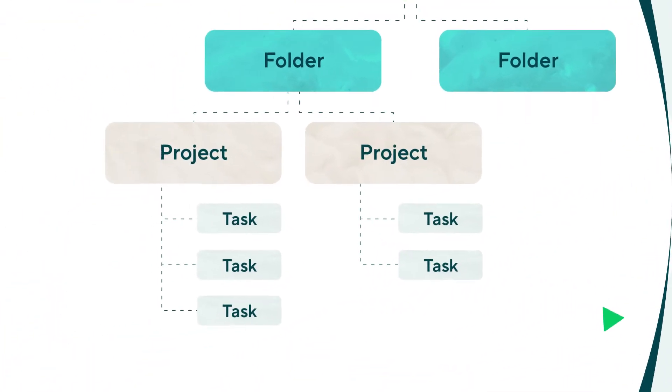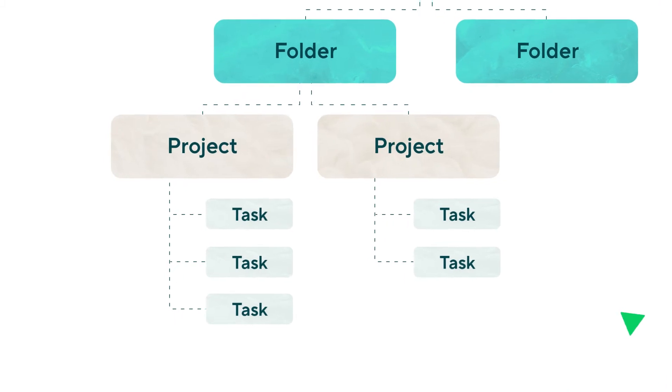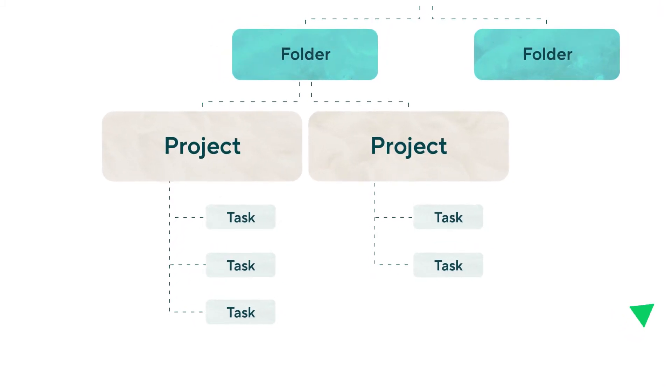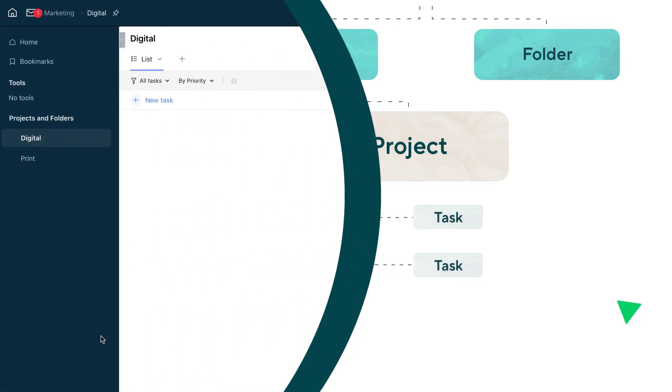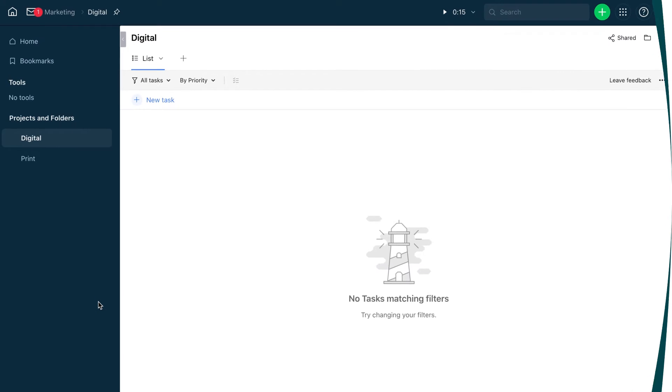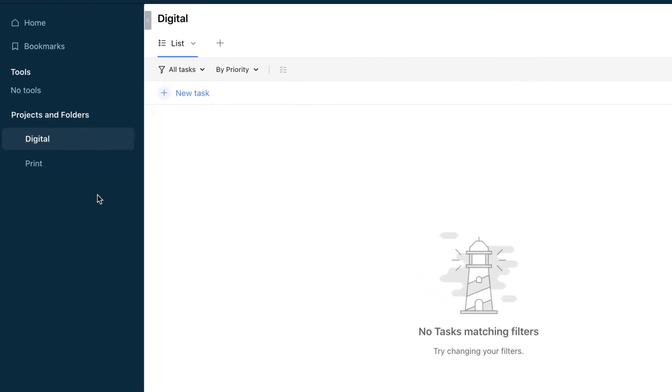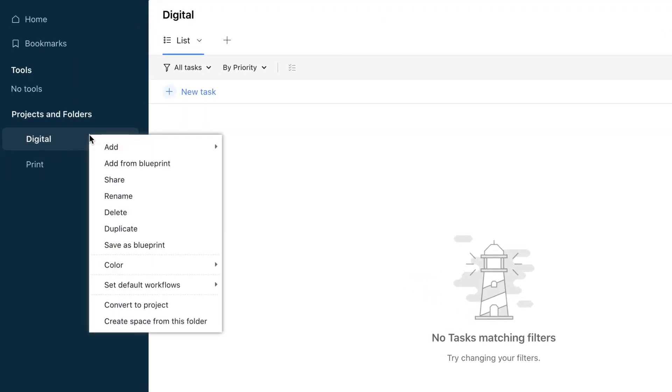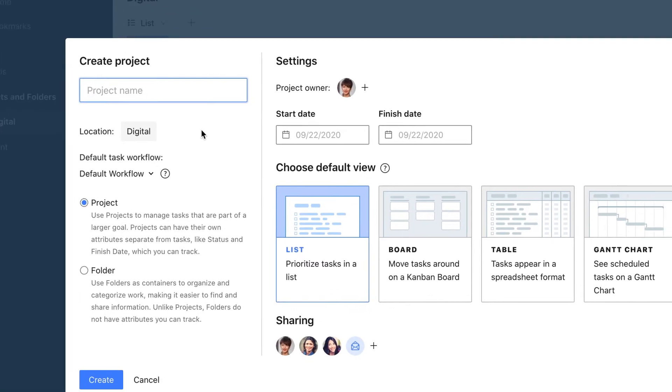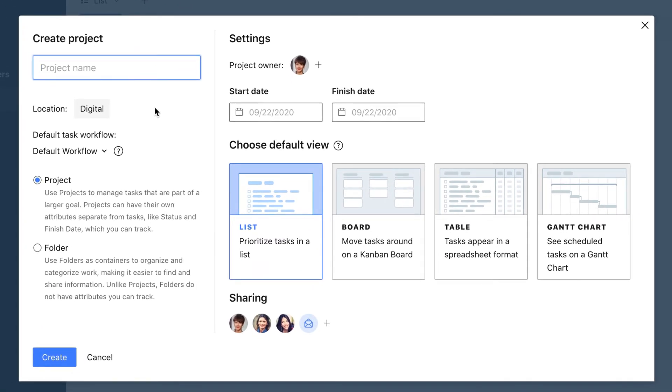Let's add our first project to the digital folder. A project usually contains several tasks connected to a single goal with a deadline. We right-click the digital folder, hover over Add, and choose Project. We need to give our project a name. We'll use Webinar and set start and due dates.